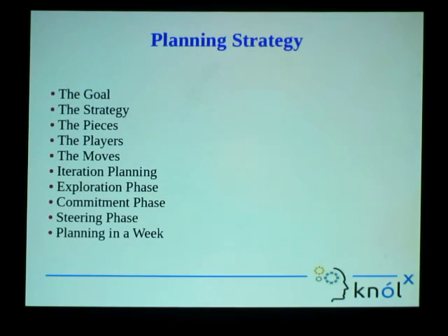It all depends on the development team. If your team can deliver it, then it's quite good. Otherwise, you have to tell them. Because before building that feature, you have to make an estimation of how much time it will take. You always put a time to this task, I think. Yeah. So as soon as you put a time there, you tell them that this much is the time this is going to take, and it has already exceeded the release cycle.